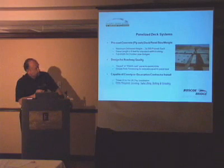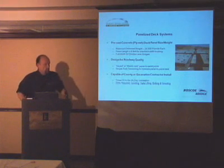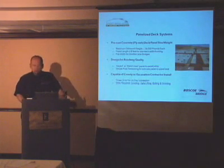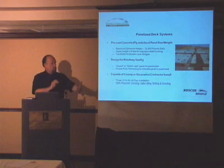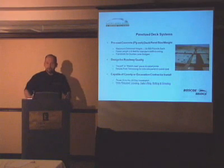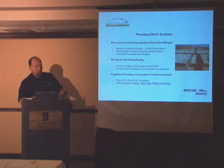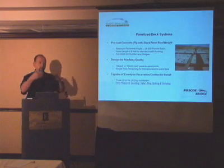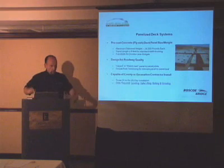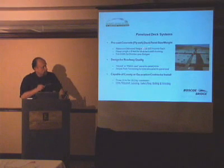So what we're talking about is trying to keep the crane capacity down, with delivered weights of less than 24,000 pounds apiece. You might ask, why 24,000 pounds? Because to deliver these out to a rural county, you want 2 deck panels on one standard over-the-road truck. About 48,000 pounds is very easy and cost-effective for trucking across quite a bit of distance. So that allows double panels on each truck. If the panel is 24 or 28 feet wide, the length itself would be less than or right at 8 feet, so they can use standard trucking without getting into over width trucks, and it also keeps the crane lift capacity down.